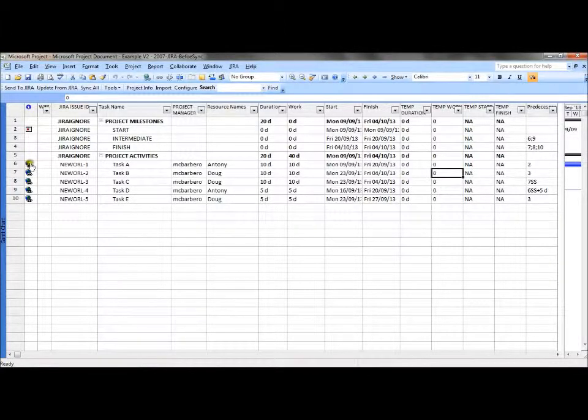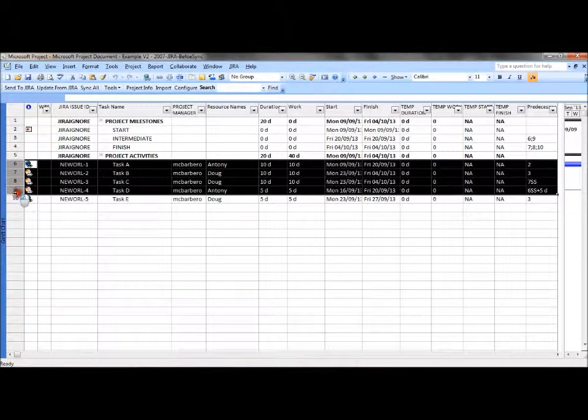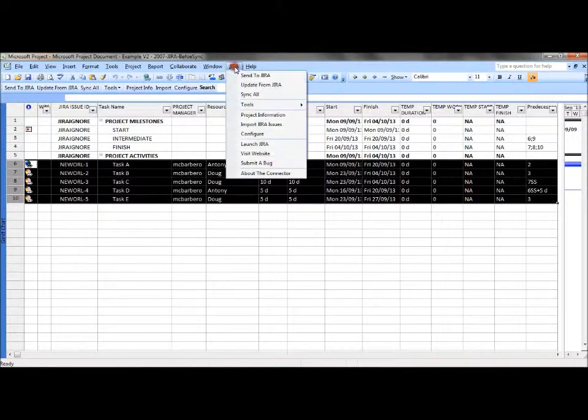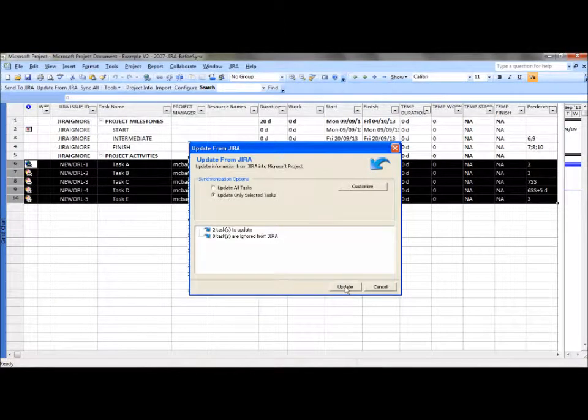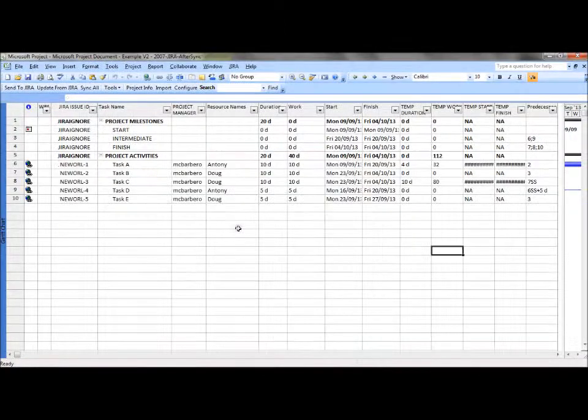The adopted synchronization rules allow us to export from JIRA into Microsoft Project the total spent effort on a JIRA task as a sum of the spent effort on all its subtasks and the percent of work done. The rules also allow us to export from JIRA into Microsoft Project the rescheduled estimated effort and elapsed duration input by the team leaders and project manager in JIRA.